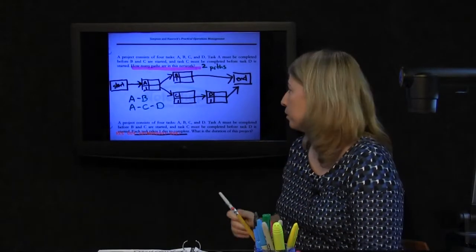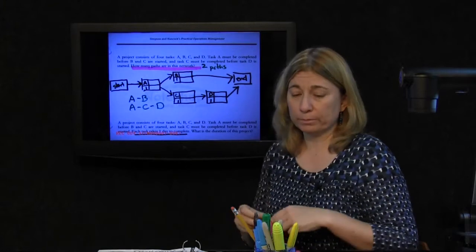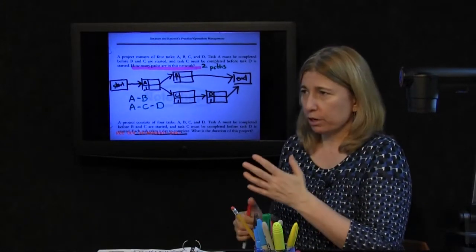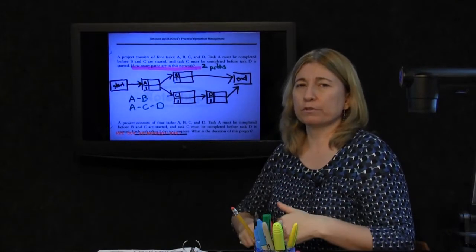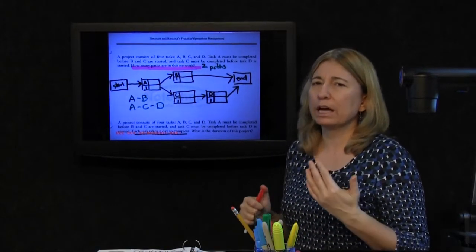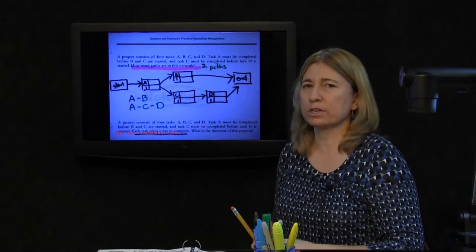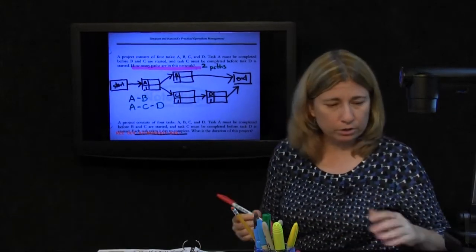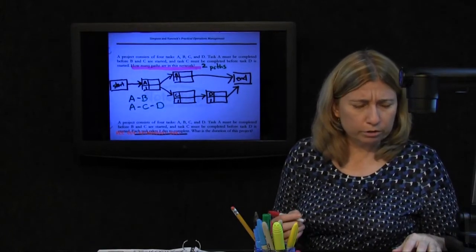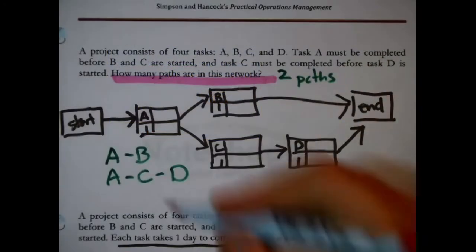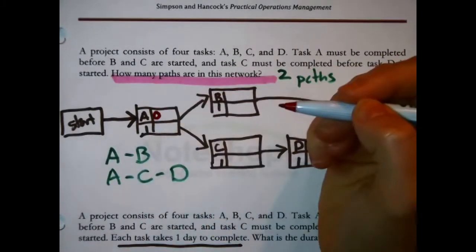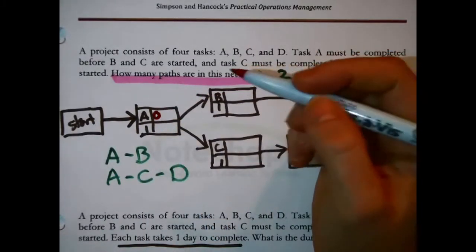Now, with this particular question, I'm going to use the network we already drew. First off, you could find the duration of the project the classic way. What would be the next step here? We would find the early start, early finish times. We can do that. Begin at the starting node. Anything connected to the starting node has an early start time of 0. Okay, that would only be A. A has an early start time of 0.